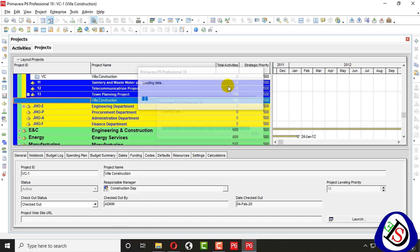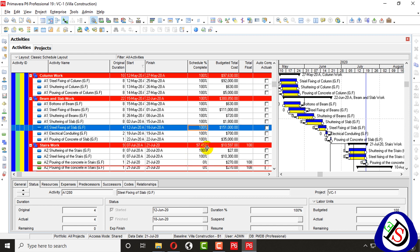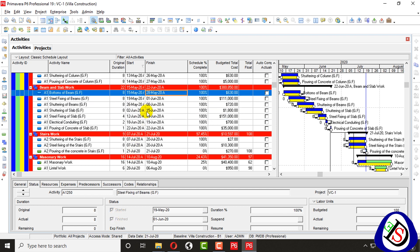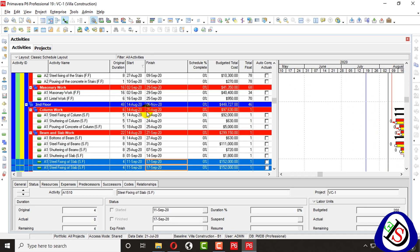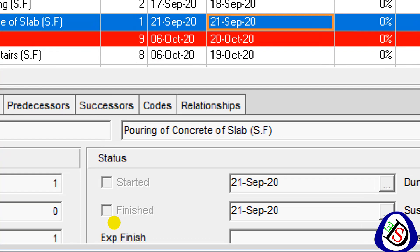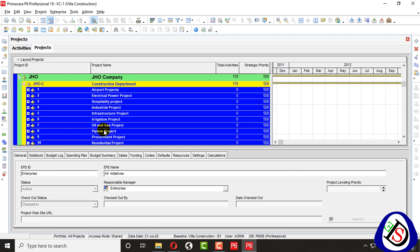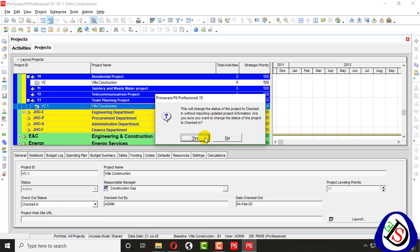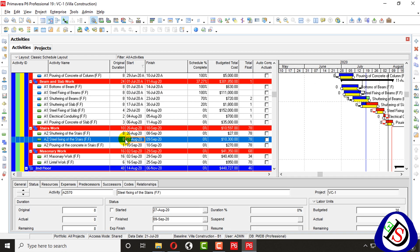When I open this project, all the progress is frozen now. You can see the started date and everything is frozen because I have checked out as admin. No operation will be successful. When I go there and click 'Check In', so now you can open this project and make changes.